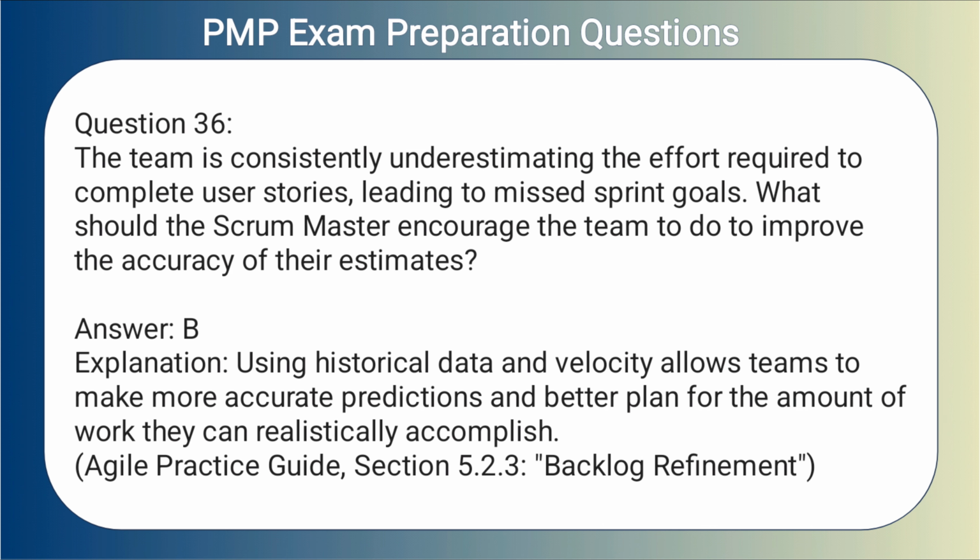Answer: B. Explanation. Using historical data and velocity allows teams to make more accurate predictions and better plan for the amount of work they can realistically accomplish.